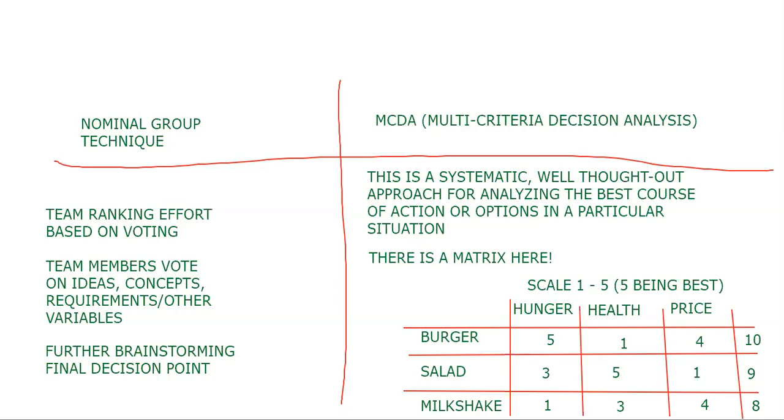It's entirely up to the amount of time you have, because some of these things take a lot of time and coordination. If I want a scrappy decision and I've got a team in a room, I could very well use a nominal group technique and get it done quicker. If I want something more elaborate, more systemic, which I want duplicated across many projects, uniformity and all that, I could go ahead and use an MCDA if I have a model, a system in place.